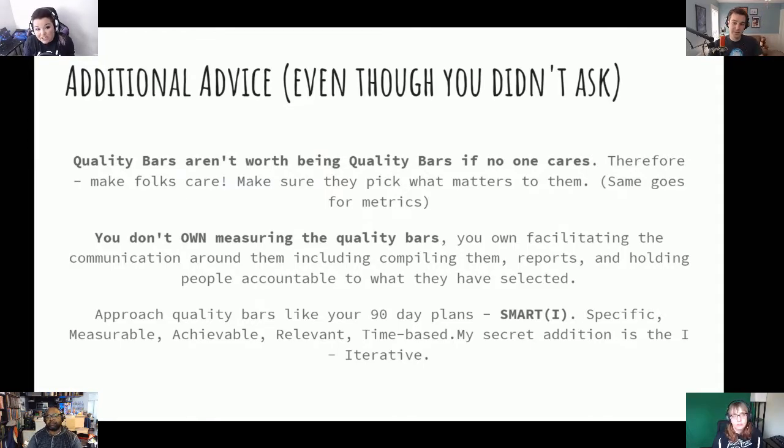The other thing to note is that because you're not going to be the one measuring all of them, you may need to build tooling around how to get to those quality bars. What if we don't have a way to measure FPS consistently and take a log and get the average and look at blips in performance, or we don't have memory leak testing, or asset validation software for the artists, or whatever. Allowing ourselves to have iterative quality bars means that we also understand the burden of the technology that we're taking on. So we have iterative technology too. I find myself constantly asking for new tools, even on a project that's 2 or 3 years old. We literally just asked our engineers to give us a tool to measure bandwidth usage, because this was not something we had previously been able to look at. Now we need to pay attention to how much bandwidth we're using, and in order for QA to do that, we're going to need a tool that lets us do that. 100.